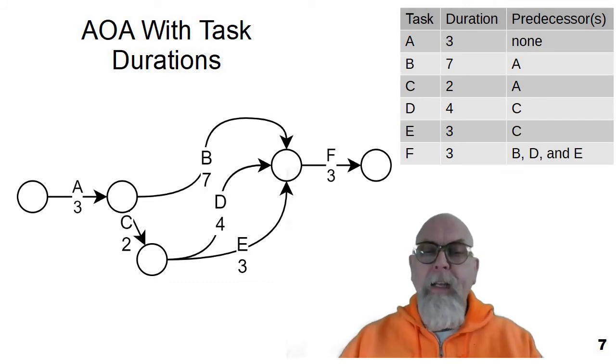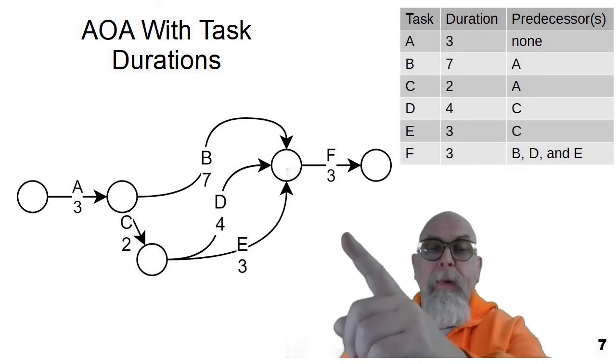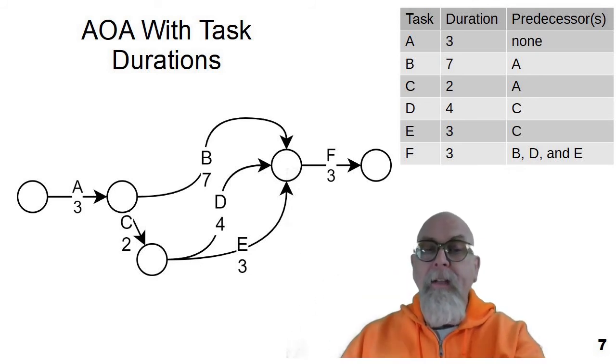Because both D and E move from the state of this node down here, where C ends, and they both go to this state here, where F begins. So we would have to make them curve or zigzag or something. So there would be this network represented by the AOA diagram.